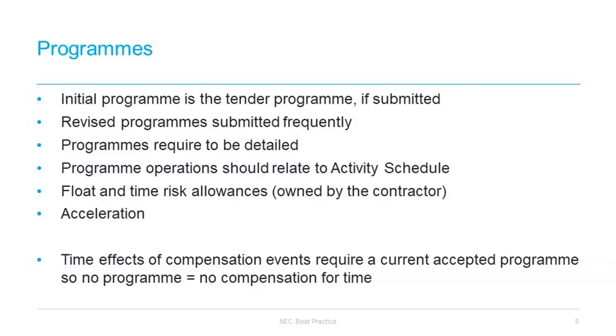Clause 31.3 sets out 4 reasons for the employer not accepting the programme, which include the plans are not practicable, it does not show the information that the contract requires, i.e. has insufficient detail, it's not a realistic reflection of the contractor's plans, or it does not comply with the works information. These are relatively subjective, so the employer has some power here.